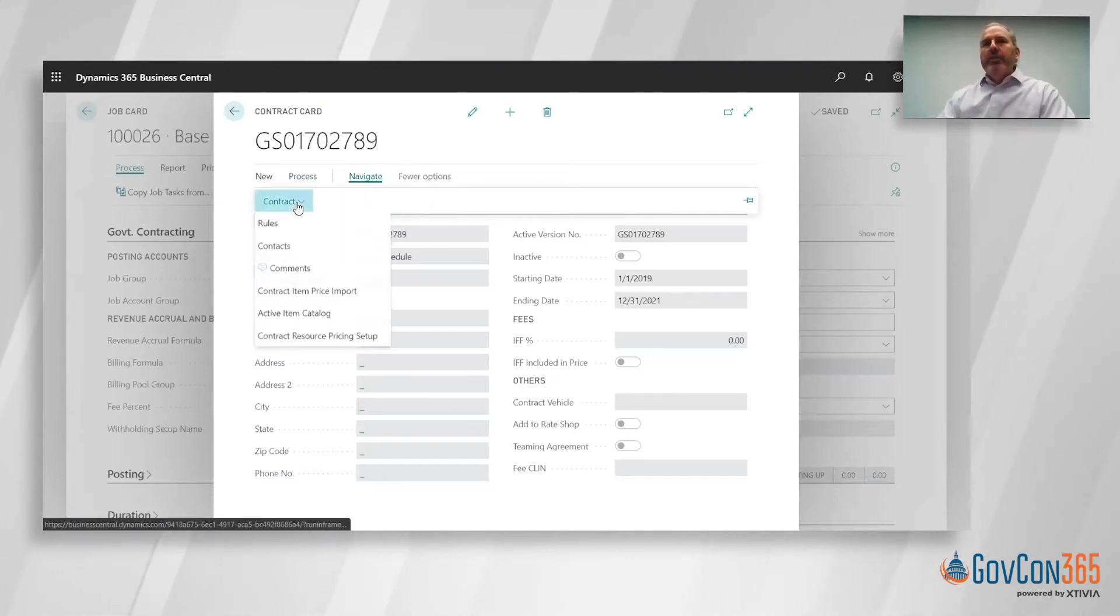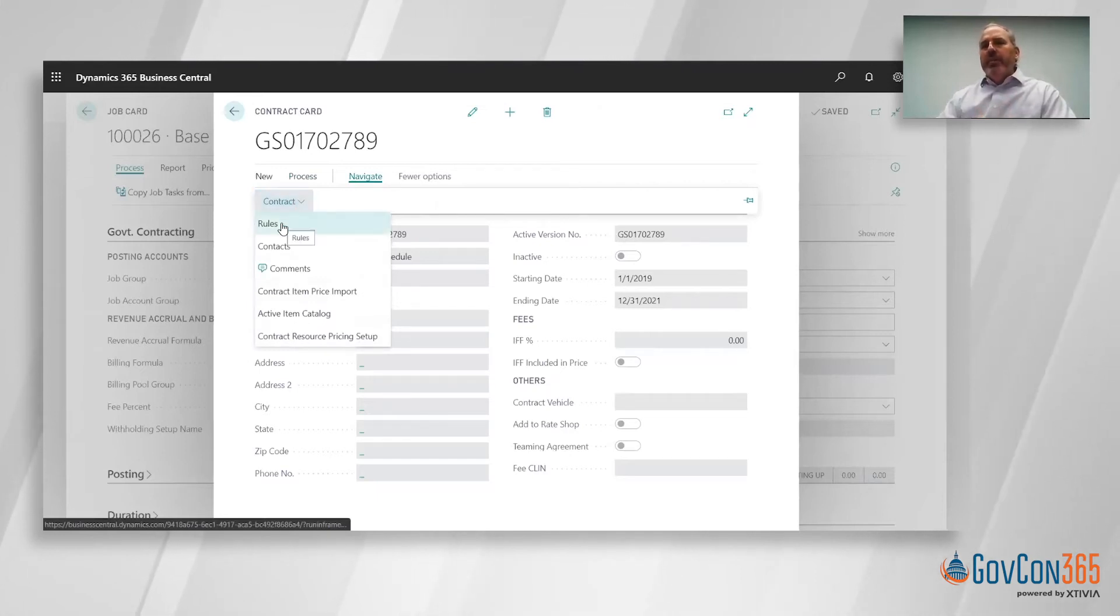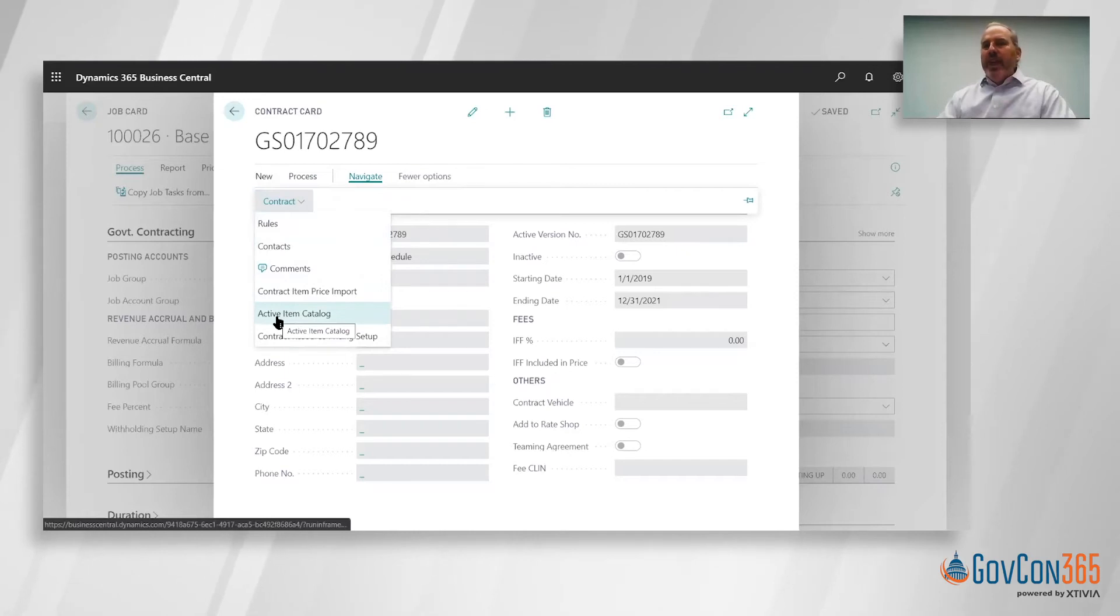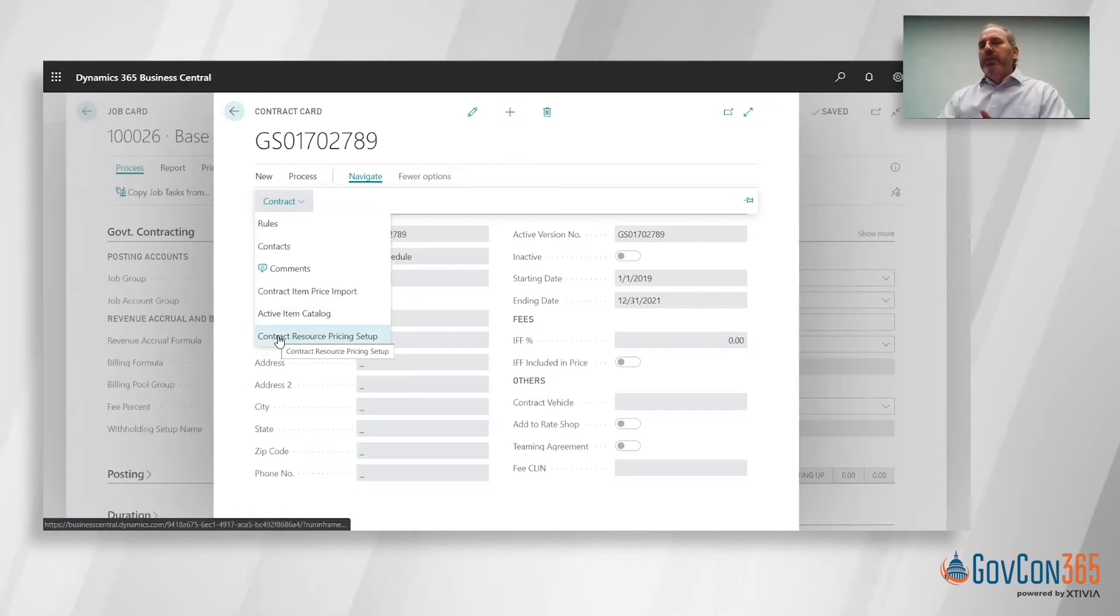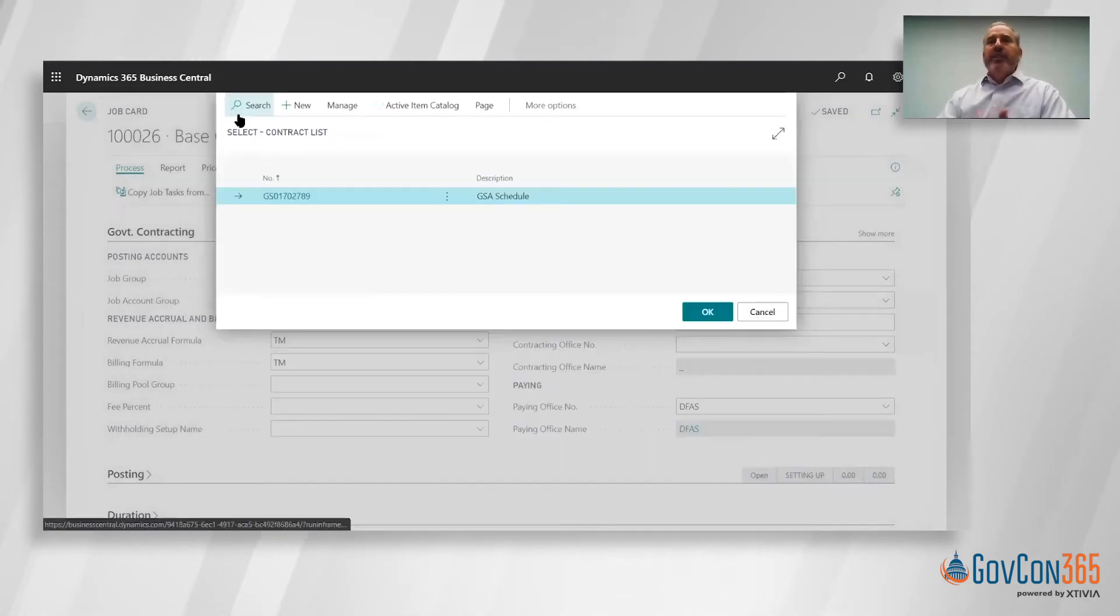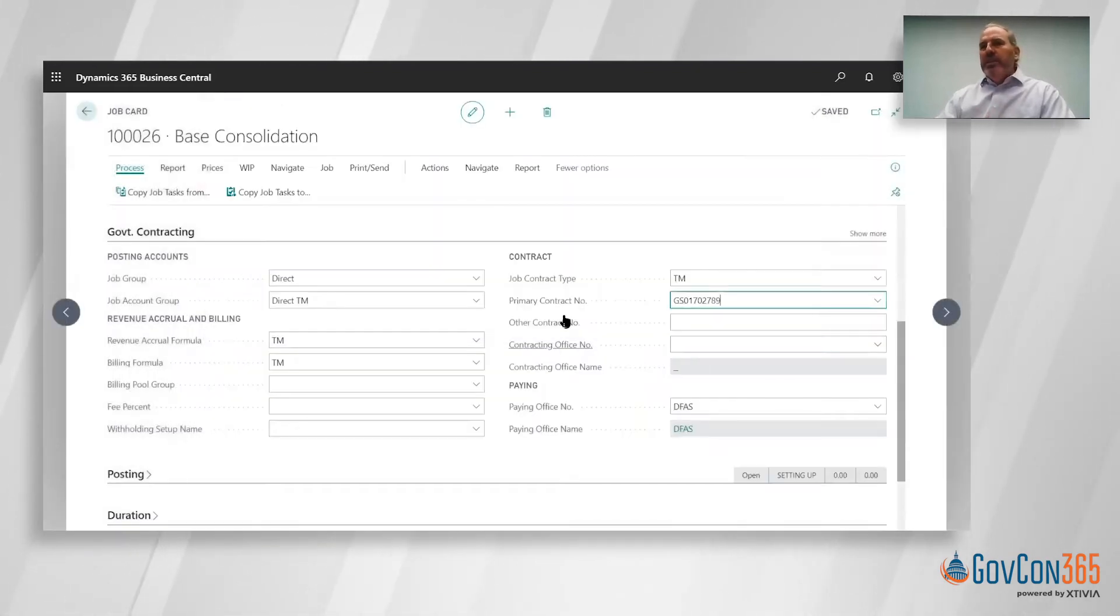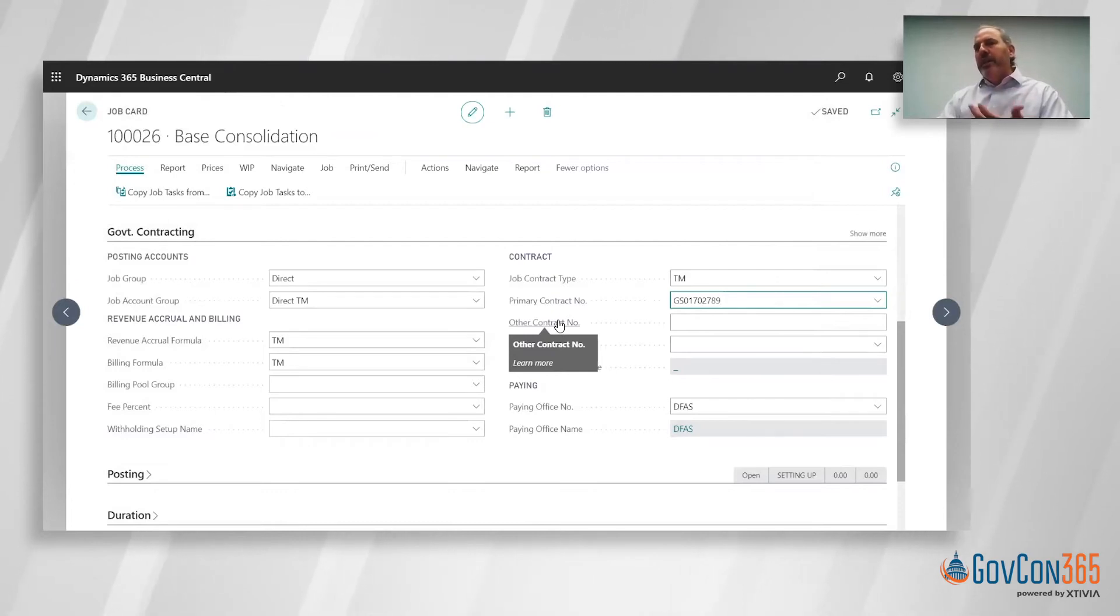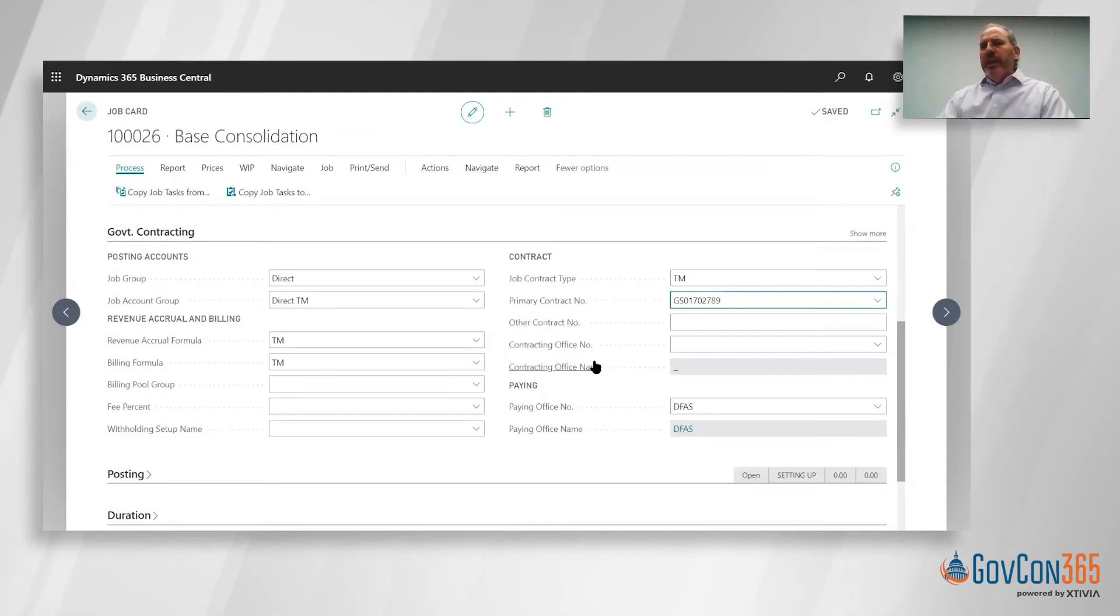Related to that same scenario, we also have the ability to set up contract rules, multiple contacts at the client side, the active catalog which would be the approved catalog you have, then the ability to set up your T&M labor rates. What's great is you can have your predefined GSA labor rates and we've got the ability to just copy them in, and you can also offer a discount off those rates. Really some simple ways to manage the contract, be able to store your rates in one place, make sure you're not billing over those rates, and offer a discount on the individual job. We've got information about the contracting office and paying office related to that job.